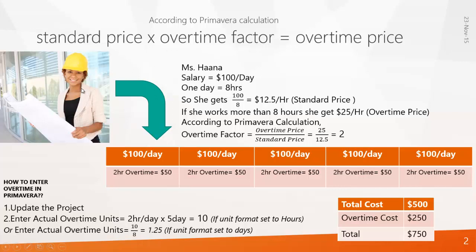So we'll see an example. This is Miss Hannah. She's getting a salary of $100 per day. According to my calendar, one day is eight hours, so that means she's getting $12.50 per hour — this is called the standard price. And if she works more than eight hours in the company, she will be getting paid $25 per hour as overtime price — this is called the overtime price.